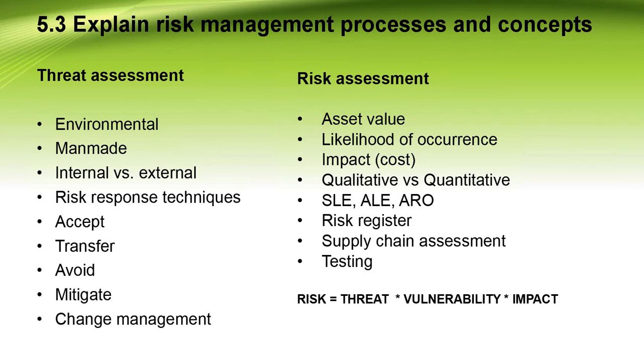Risk comes in a variety of forms. Risk analysis identifies risk, eliminates the effect of potential threats, and identifies ways to reduce the risk without the cost of the prevention outweighing the risk. Risk is a function of threat, vulnerabilities, and potential impact. Assessing the level of risk is often portrayed by a formula. As you can see, risk equals threat times vulnerability times impact.